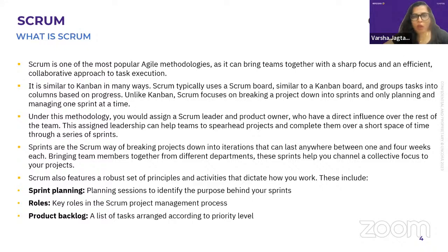So how much time would I take to deliver that particular user story? I would say 2 weeks. In that 2 weeks, I will develop that part, unit test that part, implement it and make it live on my system, and I will showcase that to the client and take feedback from that particular client within that particular sprint. So that is how my user story delivery can work.